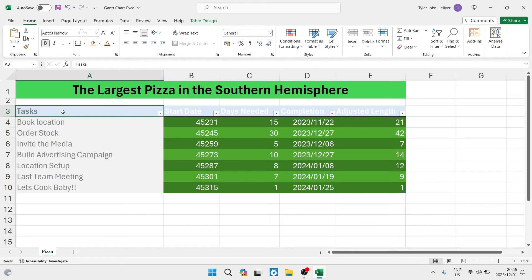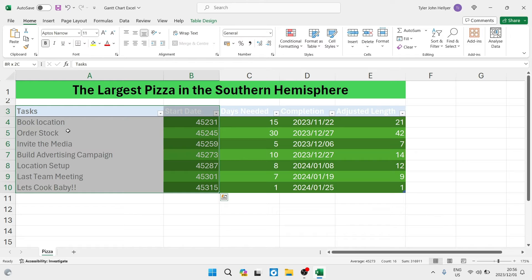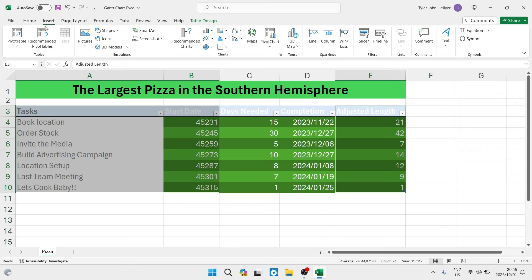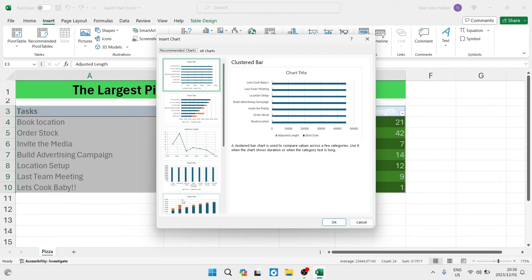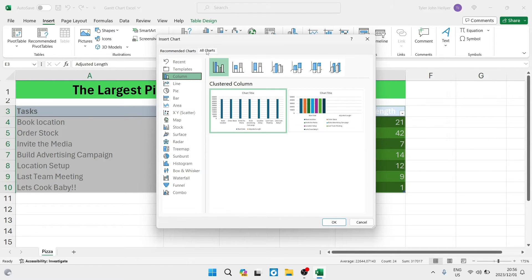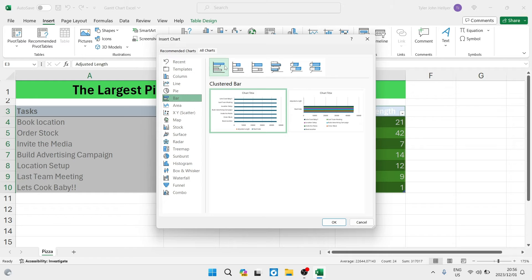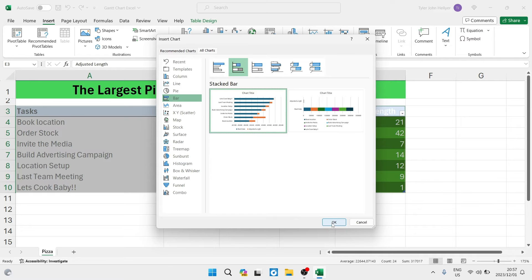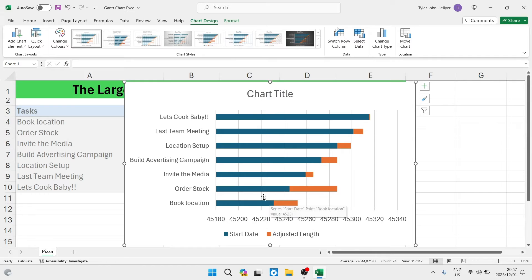Now we're going to tap on Tasks and select all of the tasks, then also select all of the start dates. Hold Control and drag your mouse cursor to also select the adjusted length column. Then go up to Insert on your toolbar and look for Recommended Charts. Once in Recommended Charts, tap on All Charts, then find the Bar graph on the left-hand side. Select the second bar graph option, which is a Stacked Bar graph, then tap on it. You'll want the first option which is already selected by default — tap OK and you'll see that you have now generated a chart.